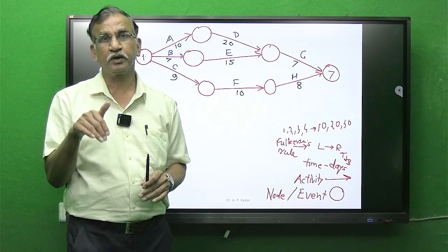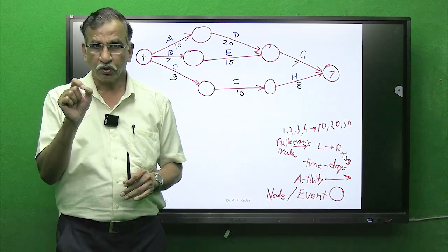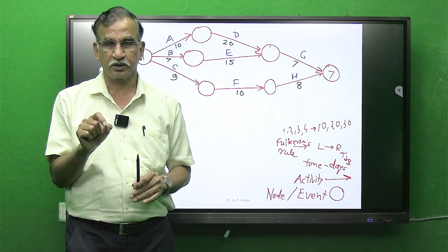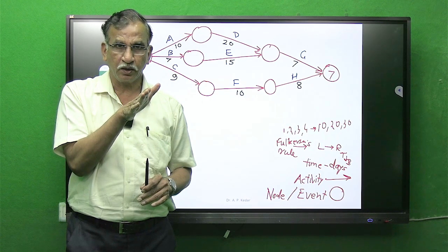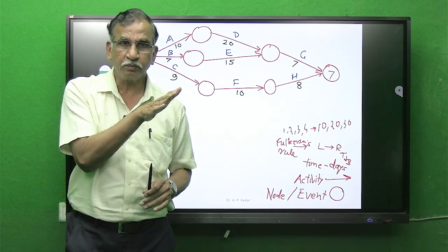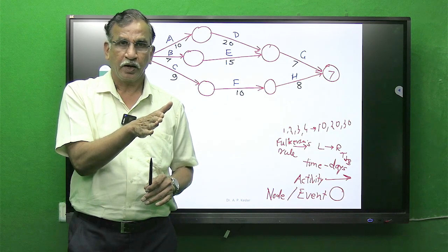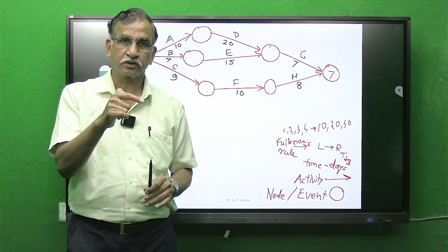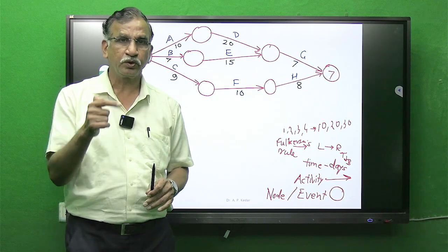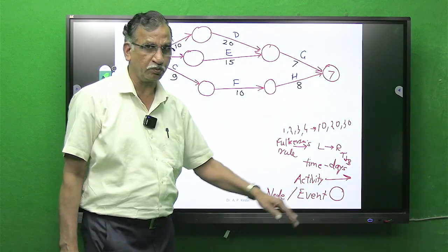It will also have an incoming arrow. Yes, you are right, true. What I have said in my yesterday's lecture is that put your palm on the incoming arrow to that particular event, assuming it is deleted, and see whether it has only other outgoing arrows. But your motion should be left to right, top to bottom.